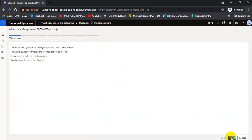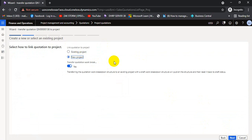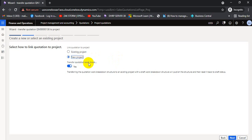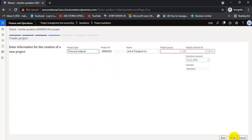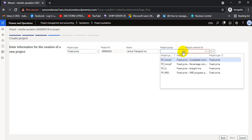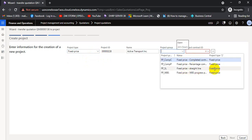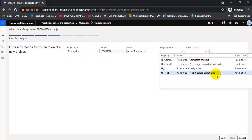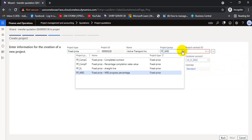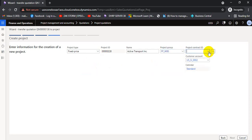After confirming, we go to the Follow-Up tab and click 'Transfer to Project.' We can create a new project or transfer to an existing one. If a project already exists, we select it; otherwise we click New Project. We turn on the option to transfer the WBS to the project. We then select the project type — in this case a Fixed Price project — and select the group, for example Fixed Price Percentage Completion.